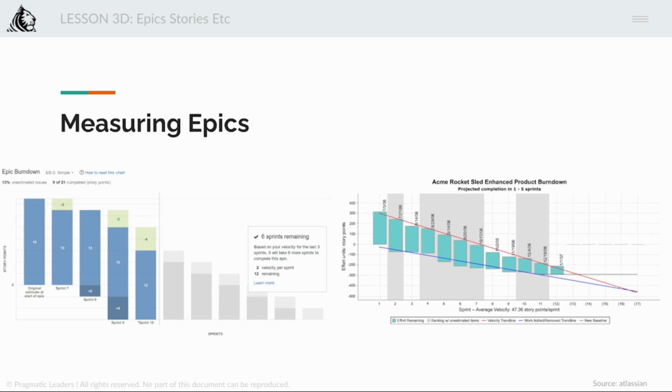Okay? Now, typically what happens in the day-to-day, and this is something which as a product manager you have to push for, is that this information, the tasks getting over and epics getting over and so on, needs to be manually and continuously updated. If you don't do it, what happens is the forecast will always be off. So you'll not be able to exactly understand when epics will be over and when releases will be over, and you'll never be able to give a good answer to the business managers.